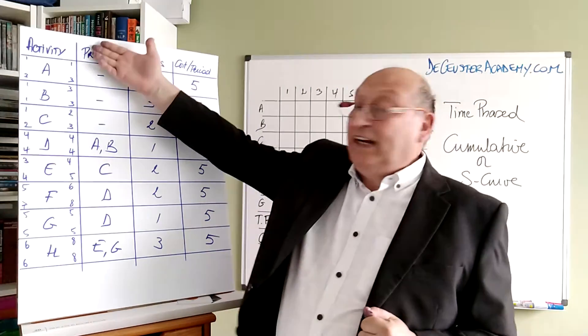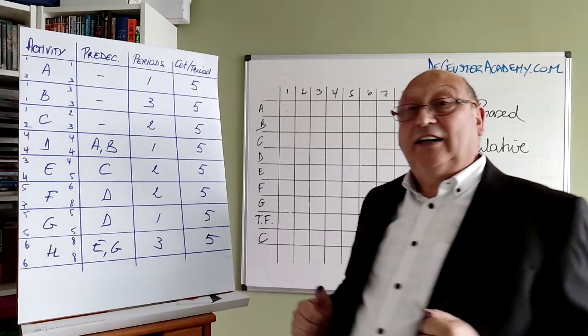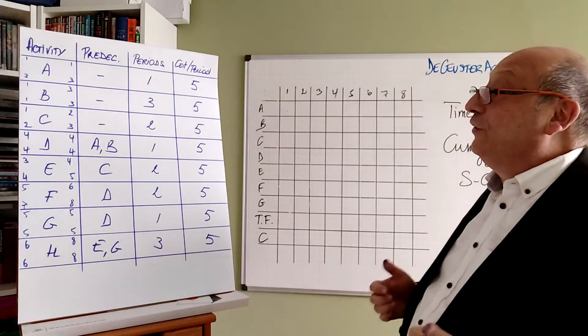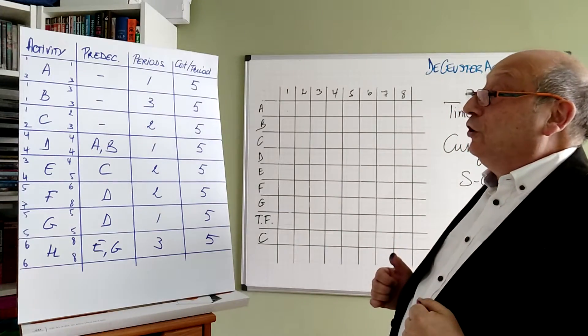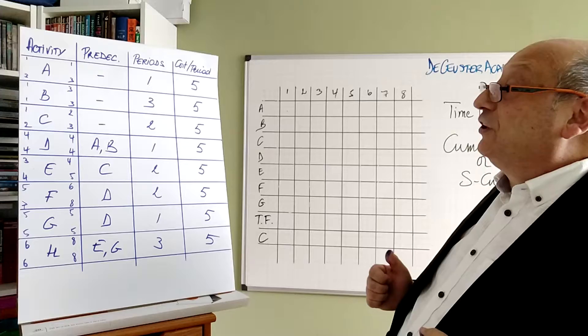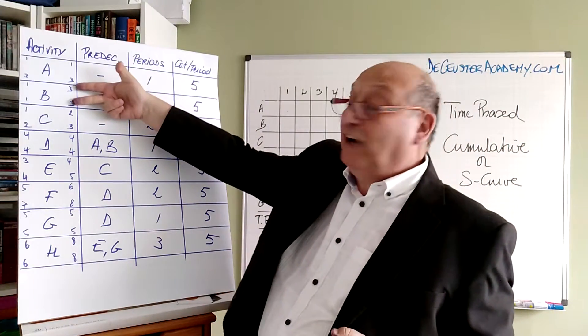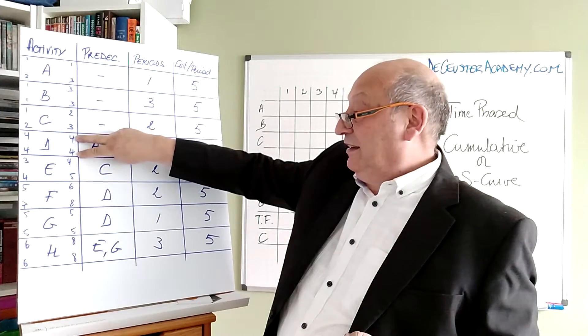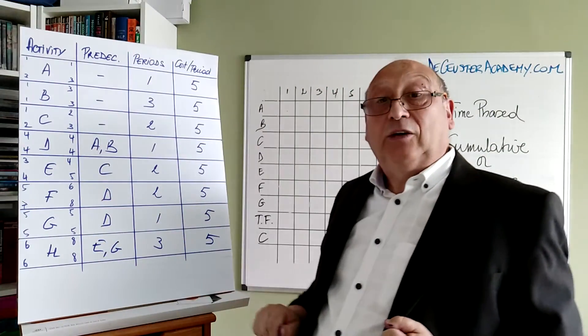On the table here you find the early start, early finish, late start, and late finish of all the activities. We also found out which activities are on the critical path because those two values are the same. So we have B, D, G, and H which are critical.